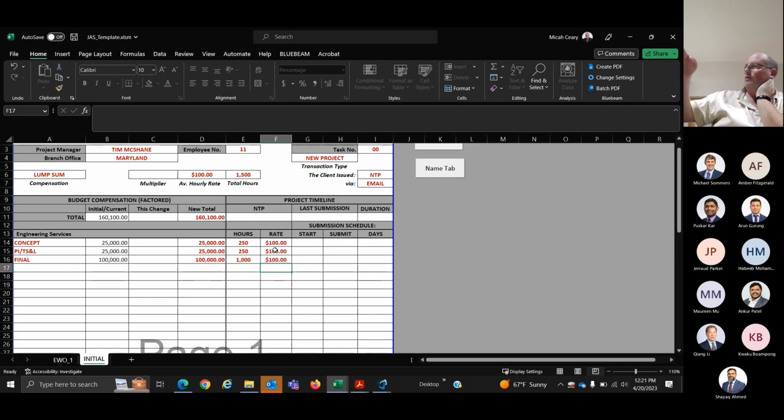I'll take the rate per category, hours divided by man hours. So I might get, say, 125 here, 80 here, I don't know, just making up numbers, and that will set your average factored rate, because we're doing factored rates here. Okay, thank you. But yeah, that's a calculation I do based on the proposal.